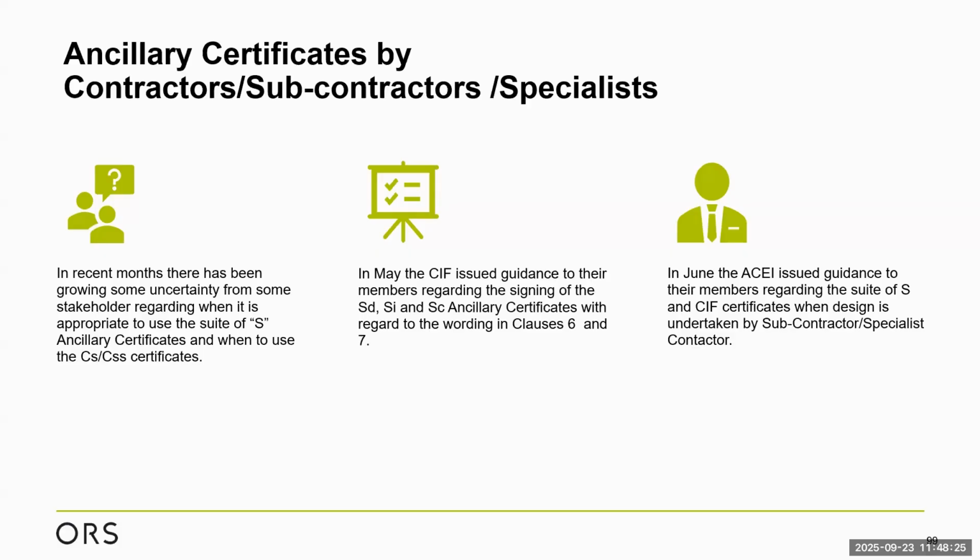In May of this year, the CIF issued guidance to their members regarding the signing of the SDSISC auxiliary certs. And I suppose the focus then was on the wording in clauses 6 and 7. Clause 6 relates to plans, calculations, specifications and particulars included in the schedule to the commencement notice or 7-day notice. And clause 7 then relates to undertaking the conditions of engagement, responsible for coordinating and integration of design within the overall scheme.